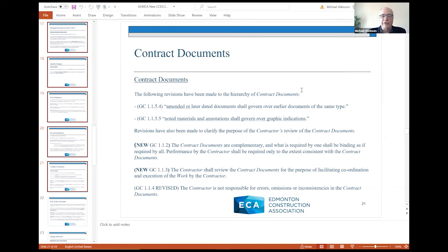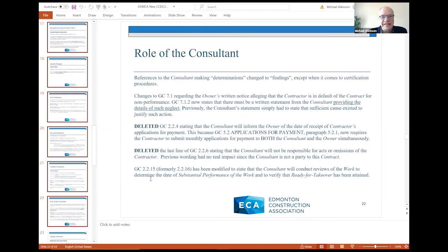I have seen some that essentially say the contractor should review the contract documents, and if they miss anything, if they don't discover an error or inaccuracy that they should have discovered, then they wear it. No extra. In my mind, that almost changes the document to a design assist or design build document rather than a design bid build document. But the CCDC has certainly clarified what is the intent behind that role.